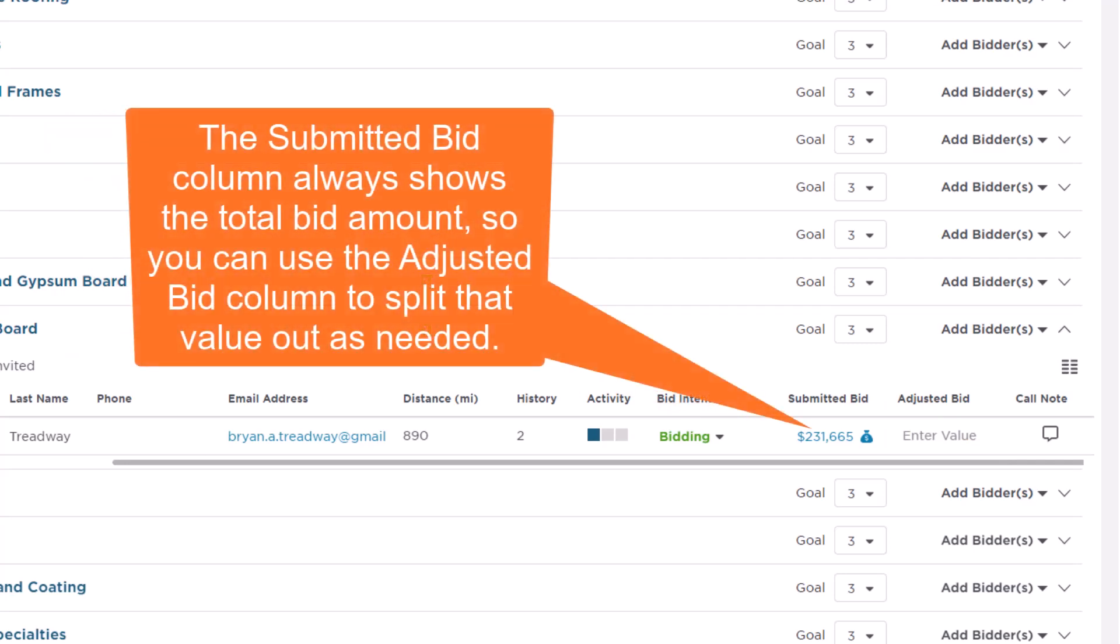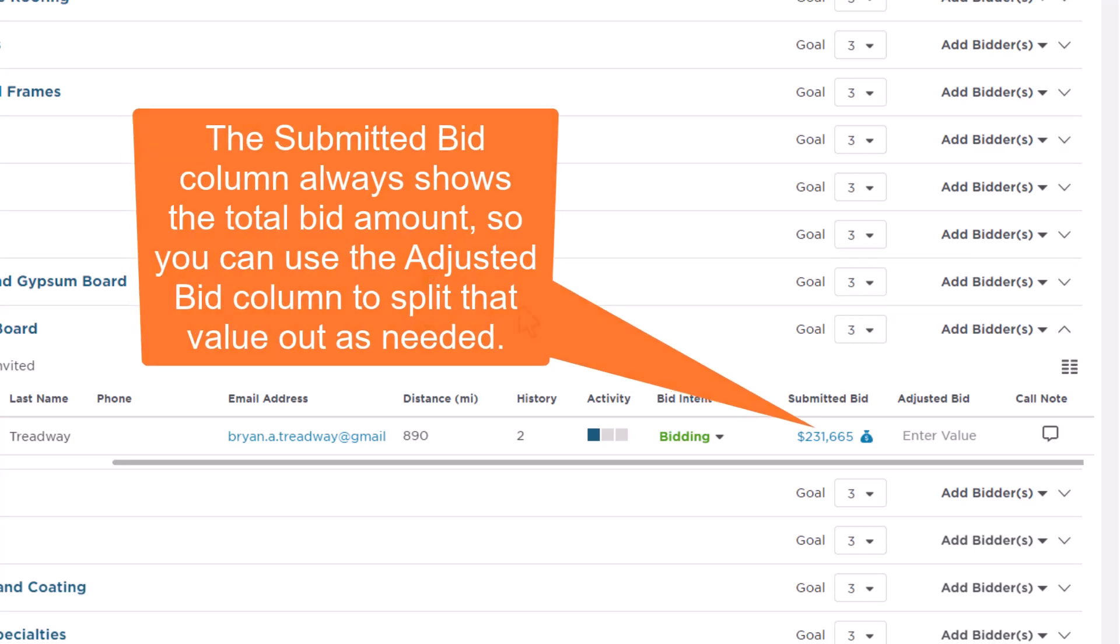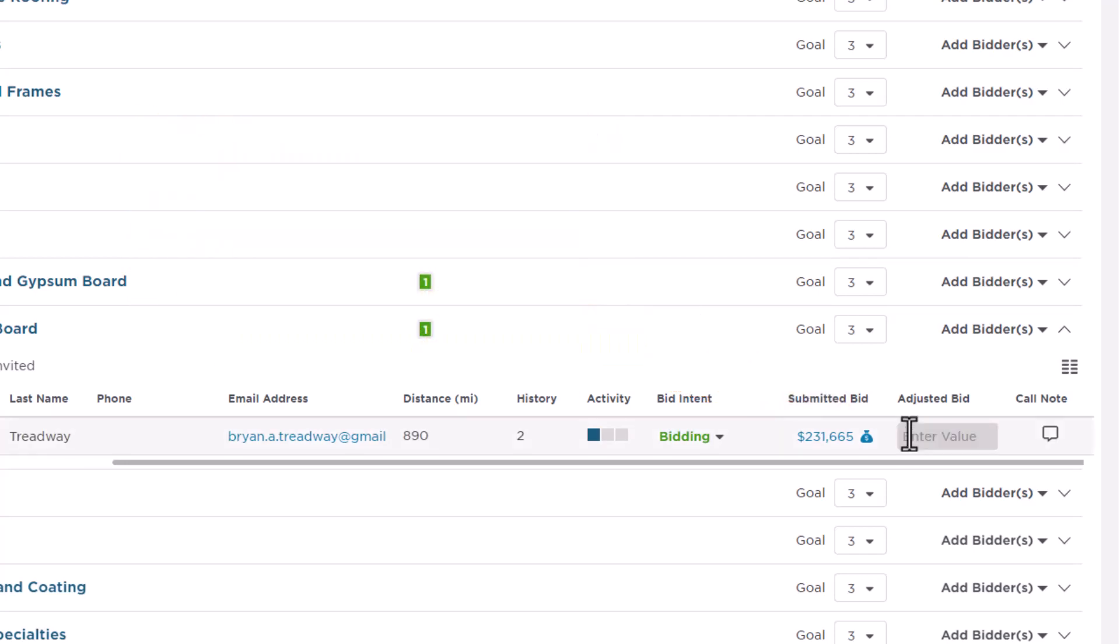The Bid Submission column always shows the total bid amount. You can use the Adjusted Bid column to manually type in a number for a secondary trade, so you can see the different amounts broken out while quickly reviewing the overall bidding details for the project.